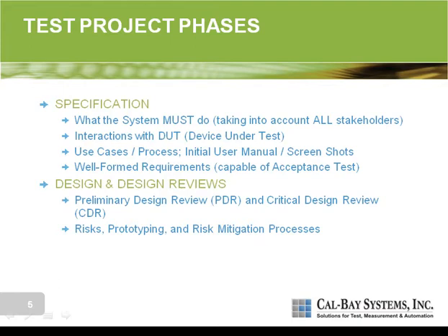Up to the point of PDR, we may be doing some risk prototyping. We may be addressing all of the risks we see in the project and trying to either write some software or look for ways to mitigate those risks. By the time we get to a PDR, we're talking not just about the project plan and the use cases, but also about what risk items are still outstanding, what we've done to address those risks, and what we need to do. Then at the PDR, all of the stakeholders come together and say, this is what I like about this design, this is what I don't like, this is what needs to be fixed.